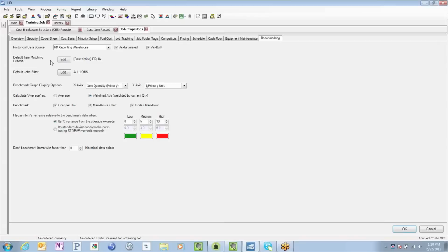How are we going to match up the data? Are you going to match it up using account codes, phase codes, descriptions? We give you control over that, as well as what projects are we going to use? Maybe we only want to drive our benchmark values from projects from a certain geographic area, maybe from a certain time period. Again, HardDollar gives the user access to defining the rules that drive the benchmark values and making sure that the benchmarking values are most relevant and valuable